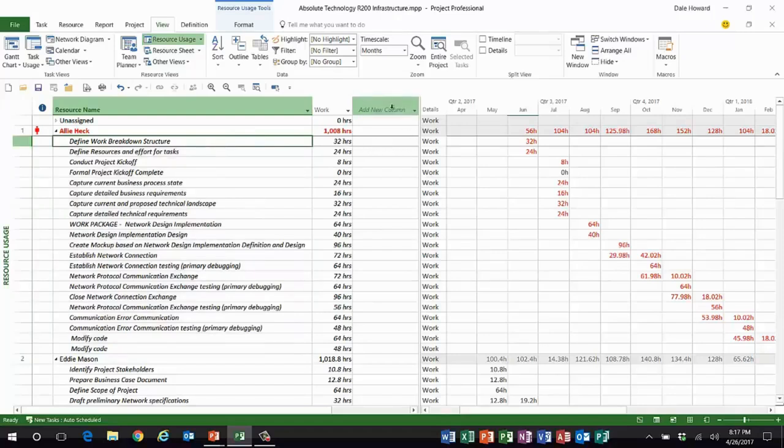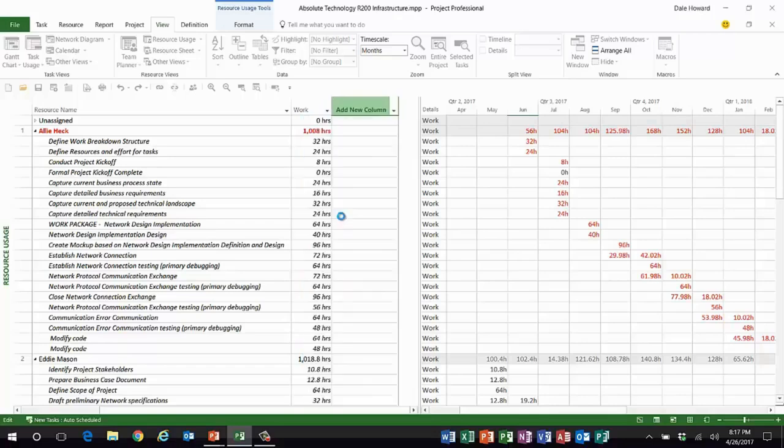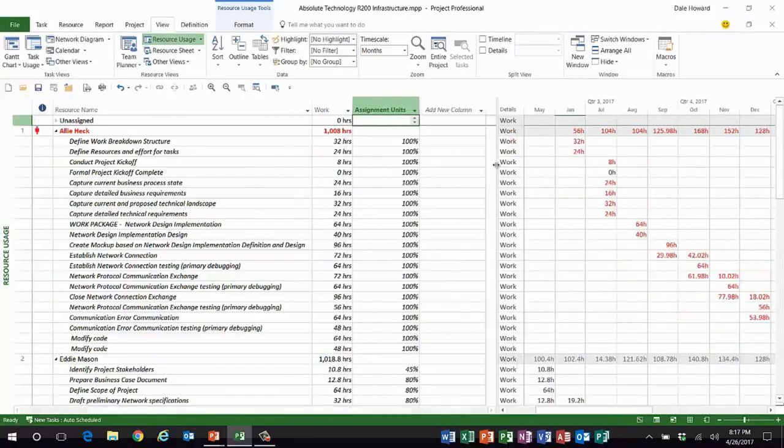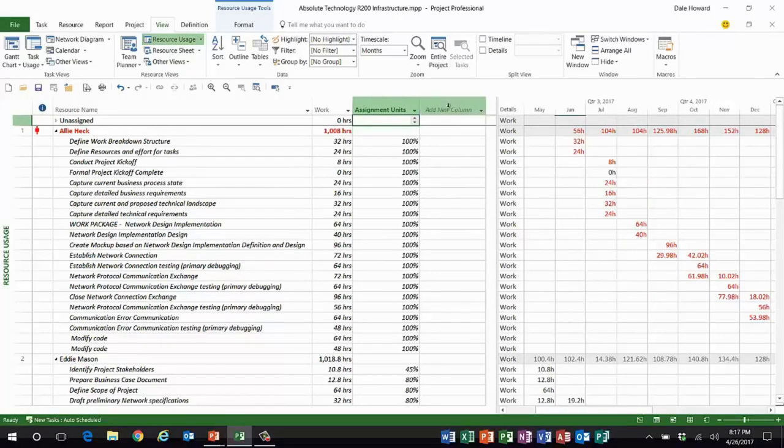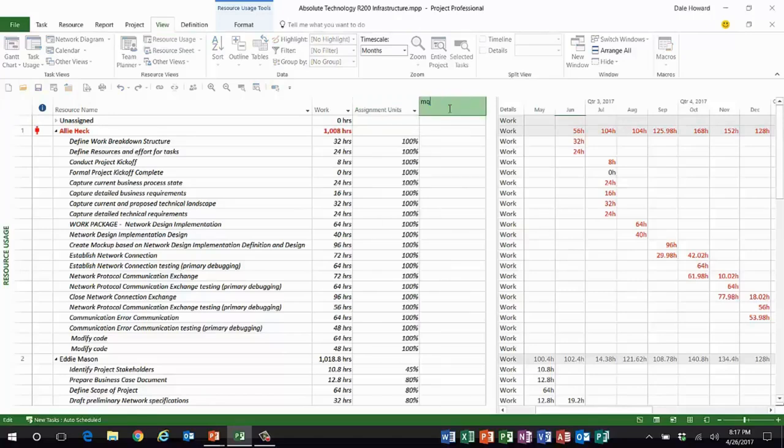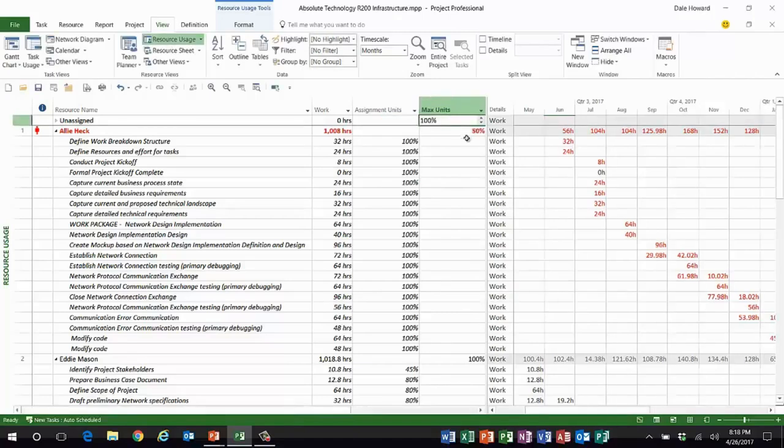I'm going to use the add new column to add a column called assignment units. Assignment units. This is the column that tells you the units value that she's already assigned on each task. I'm also going to temporarily add the column max units as well so we can see what the new max units value should be.